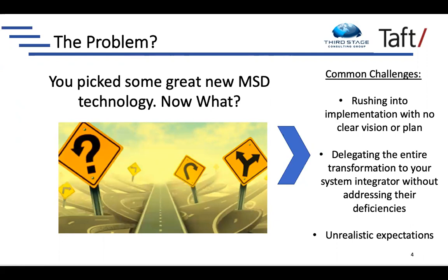What this also does is it creates unrealistic expectations when we just jump straight into our implementation. We get the feeling that we're going to speed things up by starting right away, but it's almost like building a house without a clear blueprint. If you just start building stuff, it's going to take you a lot longer and cost you a lot more money because you're going to be doing a lot of rework and you're not going to ever quite get it right unless you take that time up front to get the blueprint in place.